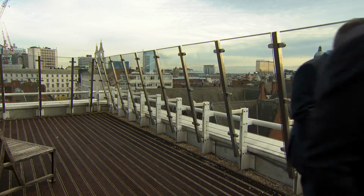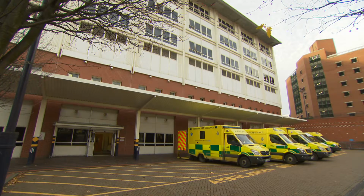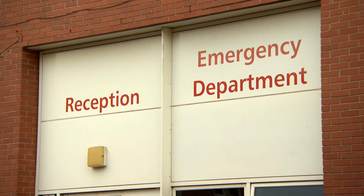Project management experience, engineering experience, but also brought a contracting structure that had been used before. So there was a contract that had been tried and tested for the delivery of similar services. So rather than going out and reinventing the wheel, we could access a pre-existing set of contracts which the energy providers also knew and understood. That's critically important for hospitals where new equipment has to be installed without interrupting daily life.